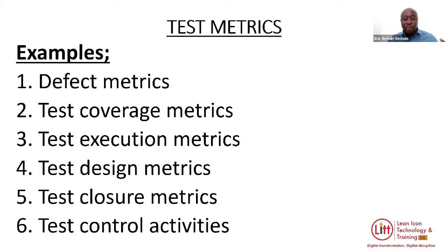So in your test plan, you define and agree with test stakeholders which of these metrics you will be using, and which stakeholders will hold you accountable for them. So the project manager will look at this and say, right, I want to see your test design metrics, or I want to see your test coverage metrics, so we know how much you've covered based on the test basis.